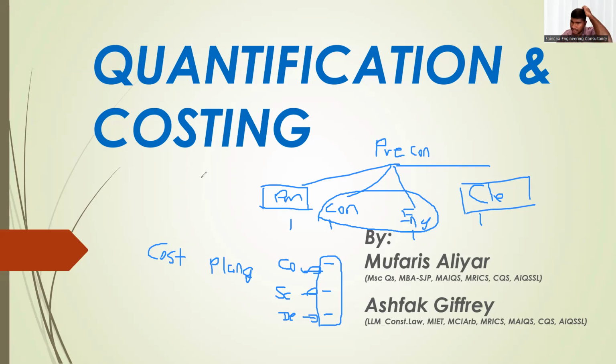Once the schematic design is finished by the architect, the QS makes the cost again and submits it to the client to review. If it is okay, they move to the detailed design stage. This is the cost controlling process during the pre-contract. That is a vast area; I'm just telling the role here. So one duty is cost planning, and reviewing the cost planning is the duty of the PMC and client QS.